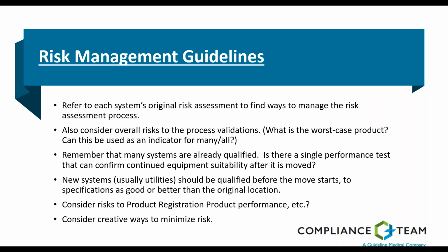What products are regulated? Are there some products that are regulated and other ones that aren't? And then of the regulated products, are there some that are life-sustaining and others aren't? So you want to think about, how does that process affect the worst case product? Can you use that one worst case product to be a test case for all?